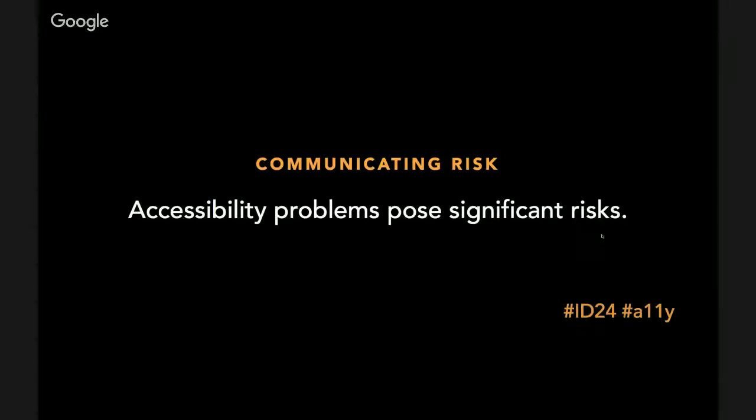So as a PM, when you start to unpack those accessibility requirements, and that work hadn't been factored in, or there's already been work that's contributed to accessibility problems, then communicating that risk back to some of the executive stakeholders that are ultimately responsible for the project will help you get more time and more resources to address things properly.